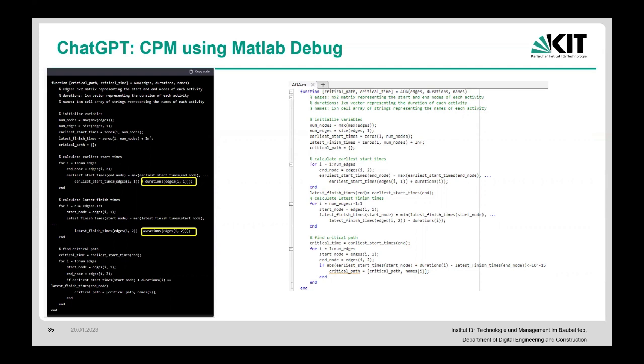Because you have 1, 2, 3, 4. That is going to be what row of activity duration you have. So it would give you some number, but it's not going to be accurate. What needs to happen here is that you basically have to follow the logic. Earliest start time for the end node. What is that? That is the earliest start time for, and of course the maximum of that, that's a separate situation, but it's the maximum of whatever you have as predecessors.